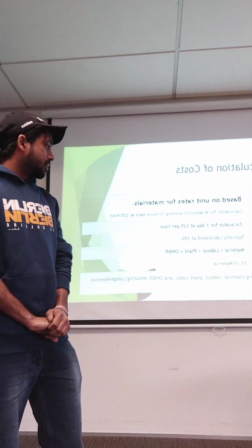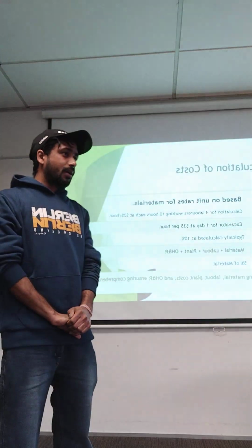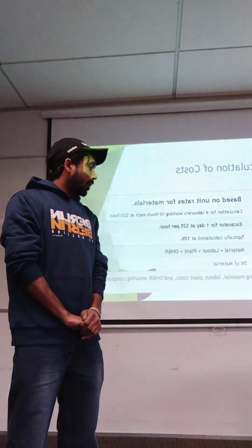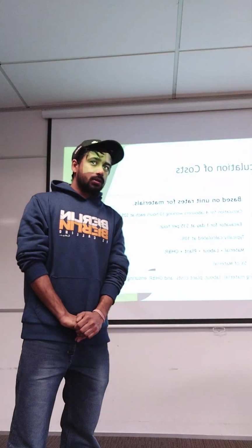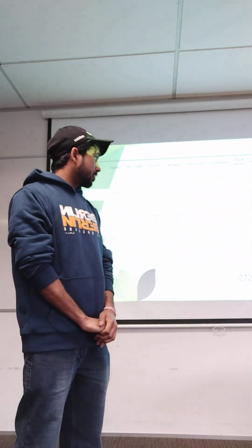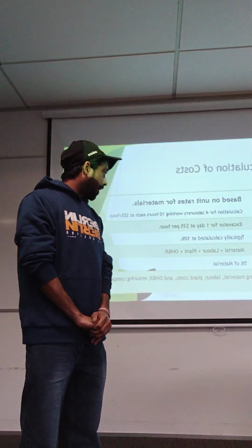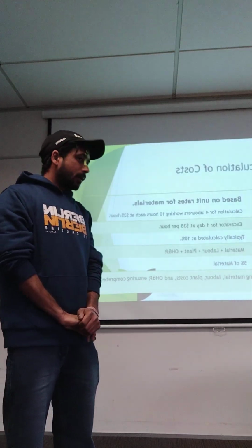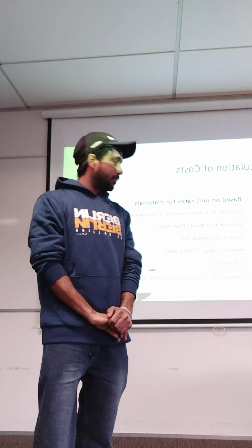And total cost calculation is material, labor, machinery, equipment, plant, and overhead expenses and profit. And wastage, which is 5% of the material cost. Total costs are derived from adding material, labor, plant cost, and overhead expenses, ensuring comprehensive budgeting.